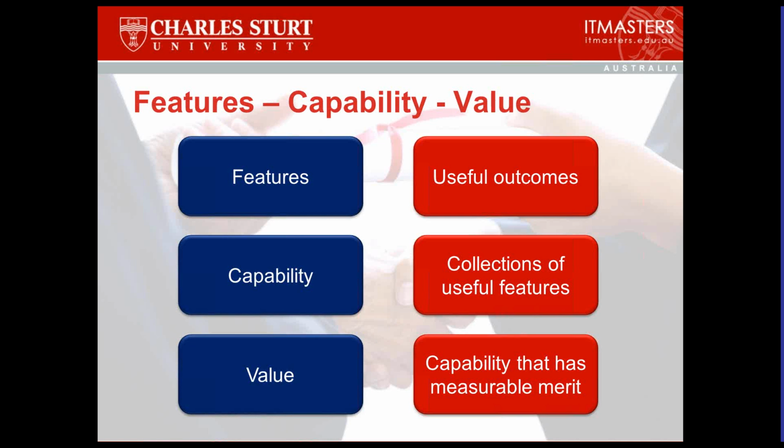Have your Scrum meeting, everyone else has their issues, we fix a few, we don't fix a few, and then the Scrum Master, whose job it is to fix all these, might sit down with the individual or a couple of people and say, right, let's talk about this. Let's get into detail. Because if they are really stymied and their work and effort is compromised, then they're going to be able to find the time and resources to spend on getting involved to fix it. And that's exactly what the Scrum Master is there to do anyway. Just take it offline and take it outside of the Scrum meeting if it needs to be that complex. Just make sure you're not wasting everyone else's time with the time it might take to solve that complex issue. But of course, it still needs to be solved. So you're still going to spend some time on it somewhere on the way.